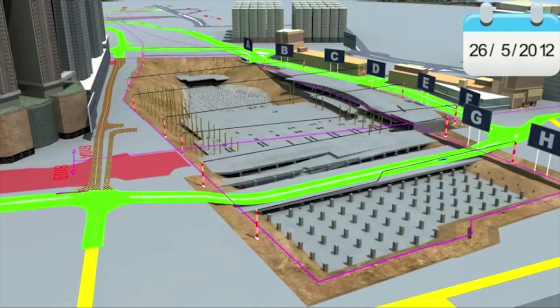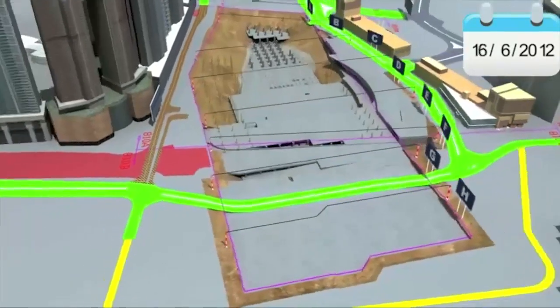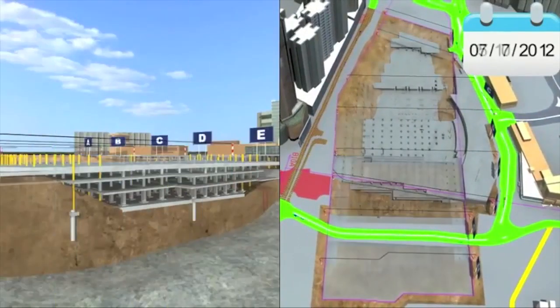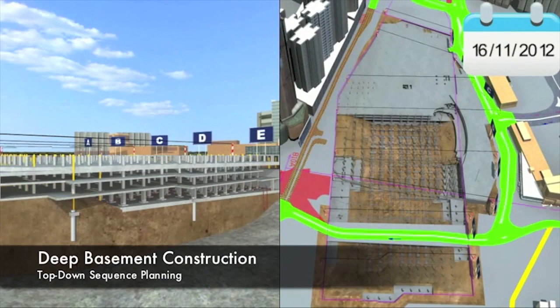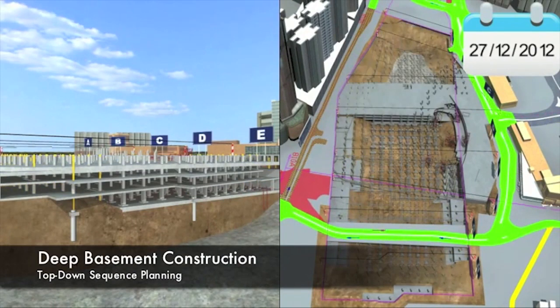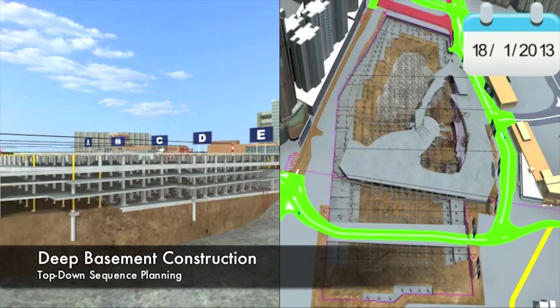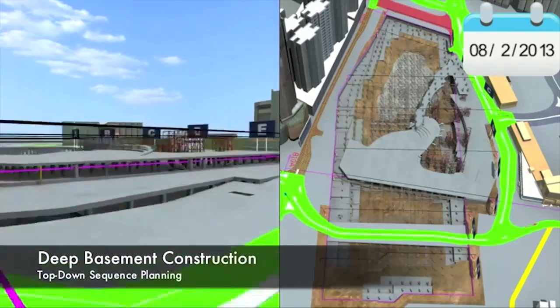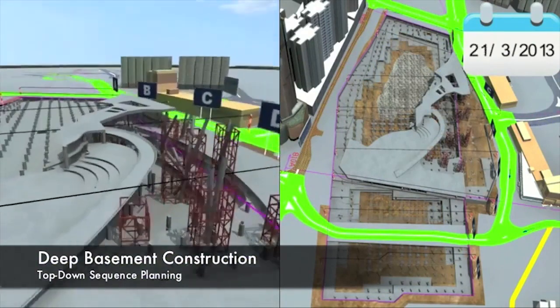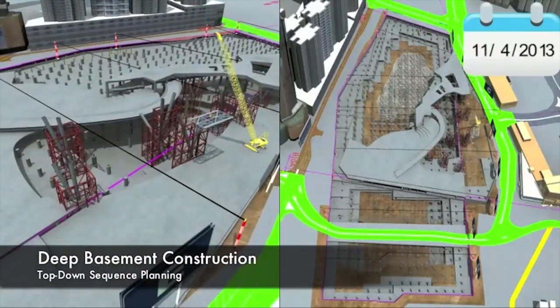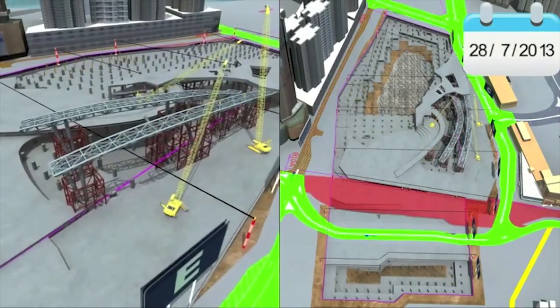Because of the visualization, we were able to see ahead that those security cabins had to be demoed before we bring the trucks in, because they would not fit. Had we not done that, we would be running in crisis, with a last-minute demo of the security offices. No one likes crisis, and that's where the money, frustration, and time are spent, and it's not worth it.